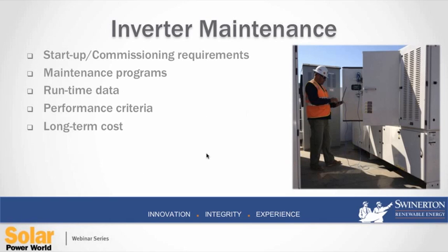A number of the EPC agreements we've seen recently have longer-term maintenance items being asked of the EPC, so maintenance programs ranging from 1 year to 10 years in some cases, maintaining the plant, especially the inverter, or like I said earlier, the brains of it.